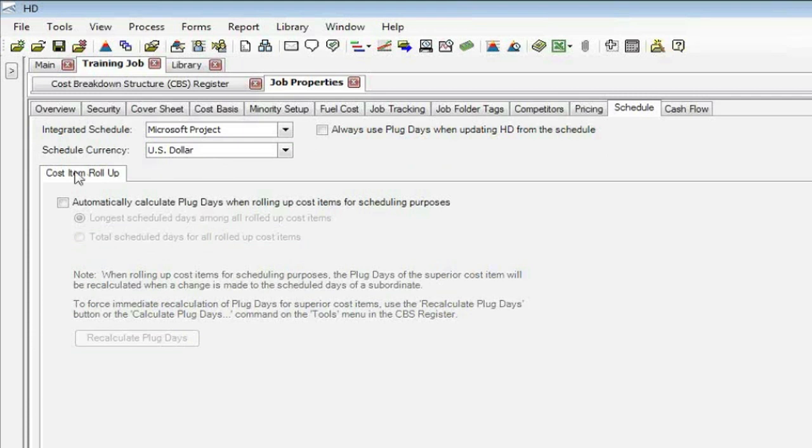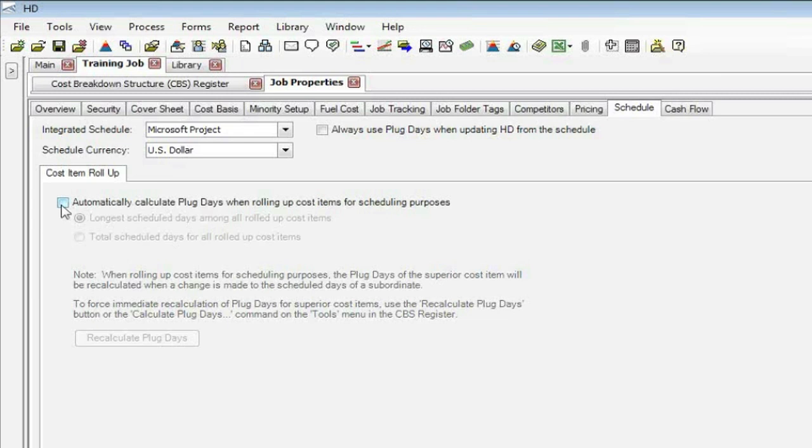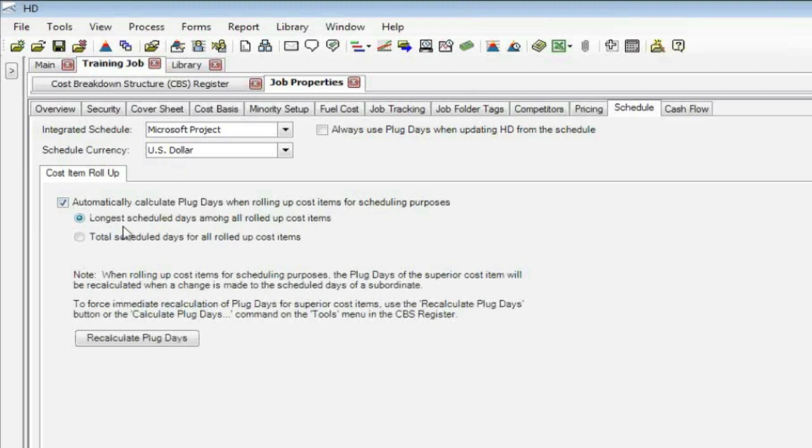So the only option here is this thing called Cost Item Rollup. What that means is we allow you to decide if you want to send a higher level cost item, like a superior, to the schedule instead of all the subordinates, the terminals. So if, in fact, you do decide to roll up, we need to know what duration would you like us to use, because those subordinates now are not part of the schedule. So with this turned on, you can say I want the longest of those subordinate items' durations, or we'll total them up. So if you do decide to send out rolled up cost items and you want a duration, this is the options that we have for us.